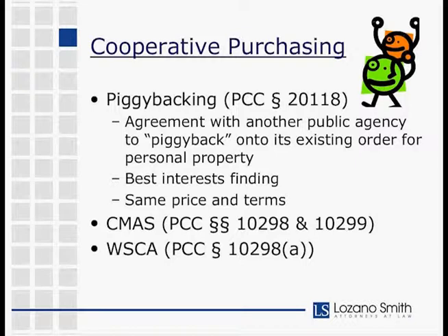In that case, the state agency was using a 10% rule, which basically said if the labor installation piece was less than 10% of the overall contract, then it was presumed incidental. If it was more than 10% up to 50% of the contract, it's presumed not incidental.